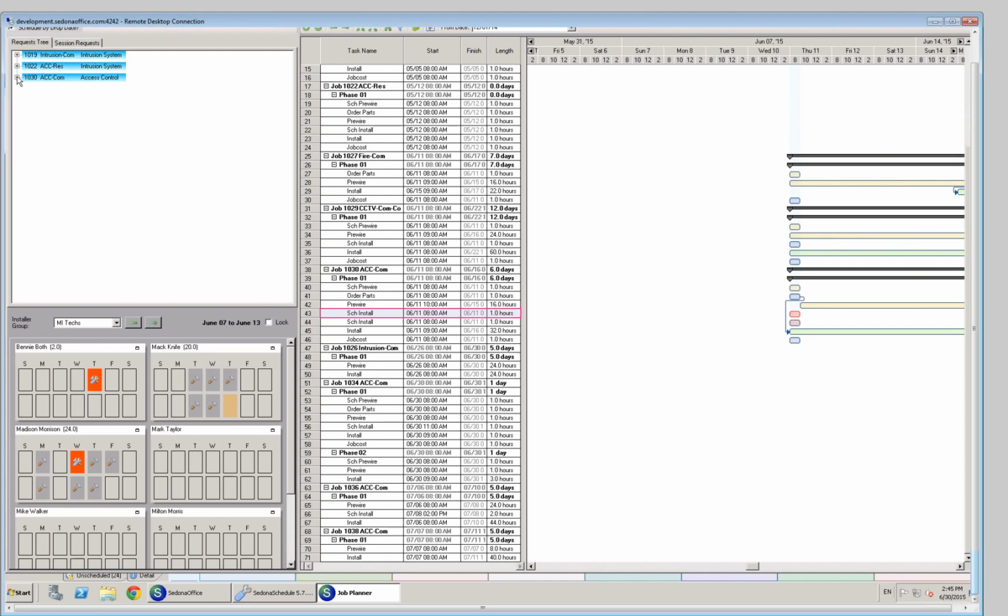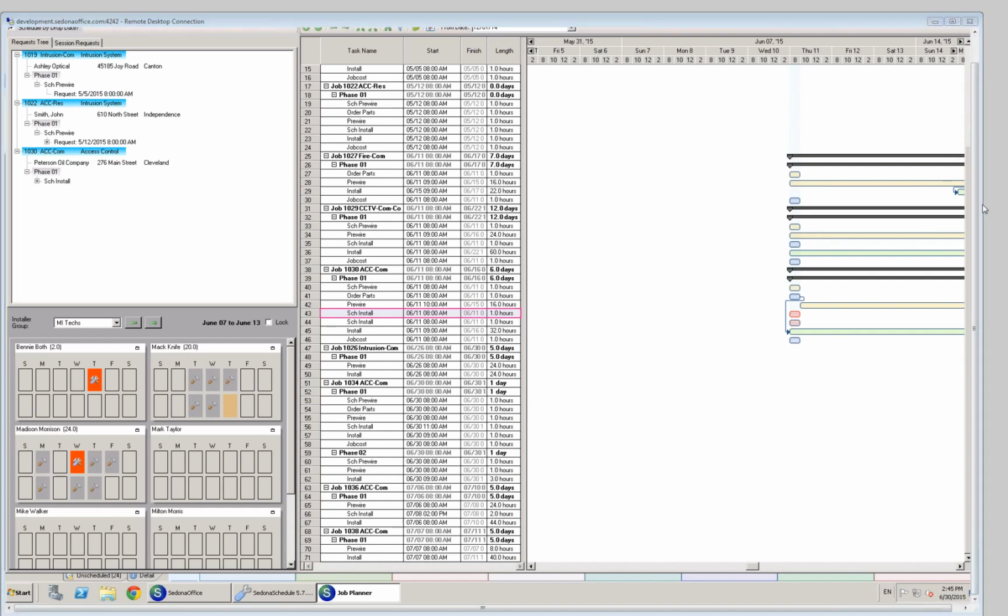So if we wanted to schedule 2 guys for the same task, that's the way you could go about doing it. And if it's going to take them half the amount of time because there are 2 guys working on it, then you would have to adjust the time, because there's no guessing on that sort of thing. So that's why it doesn't automatically let you say split this task into 2 guys. Right. Okay, let me go back to the questions.